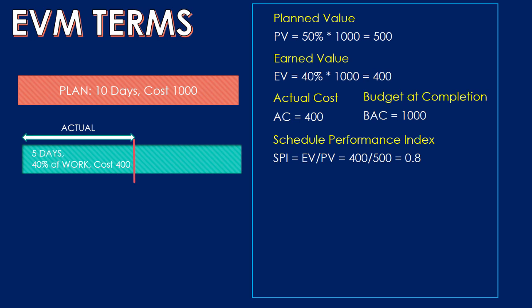Our earned value is 400 and our planned value is 500, so the SPI is 0.8. A number less than 1 means we are behind schedule; a number greater than 1 means we are ahead of schedule. The next index is the Cost Performance Index (CPI), which measures our cost efficiency. Our earned value is 400 and the actual cost is also 400, so CPI = 400 / 400 = 1. A CPI greater than 1 means we are under the planned cost; a CPI less than 1 means we are over budget.